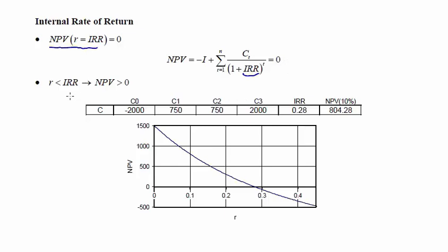And of course, if the internal rate of return is higher than the opportunity cost of capital, we conclude that this project rewards us at a higher rate, and that implies that the net present value is greater than 0. So this is a good criterion when we don't have enough information related with the opportunity cost of capital. If we arrive at an internal rate of return that is high compared to typical projects, we tend to consider that this should be a good project.